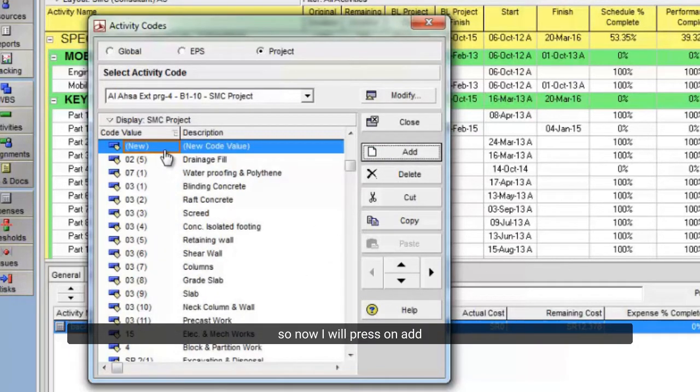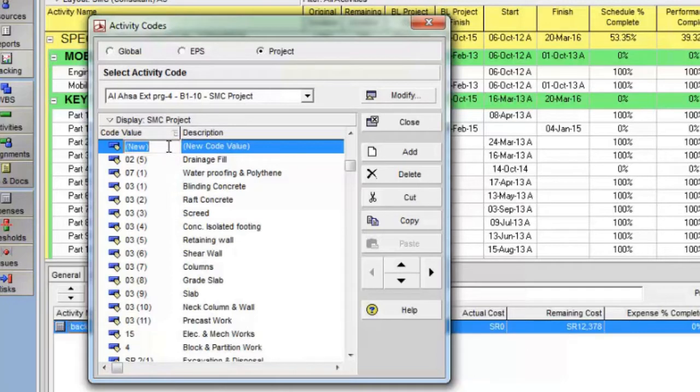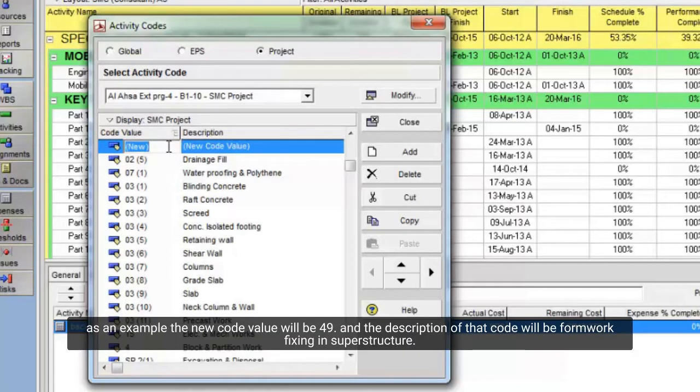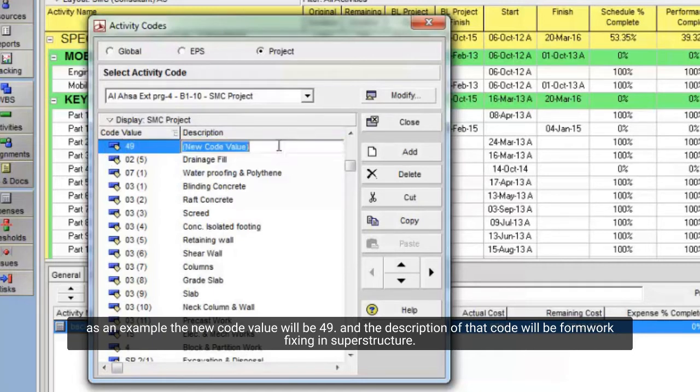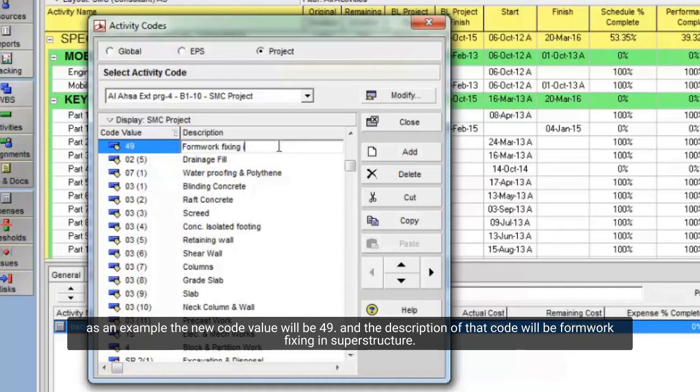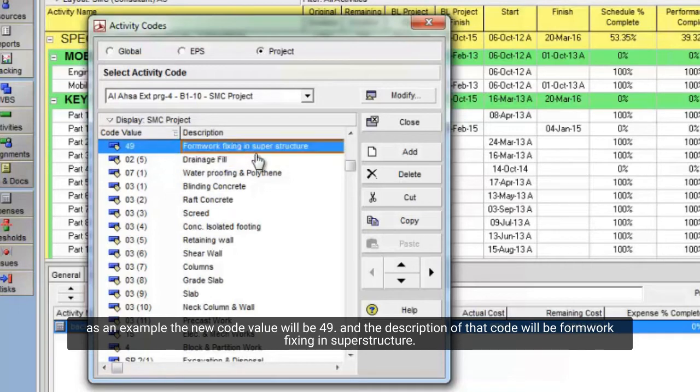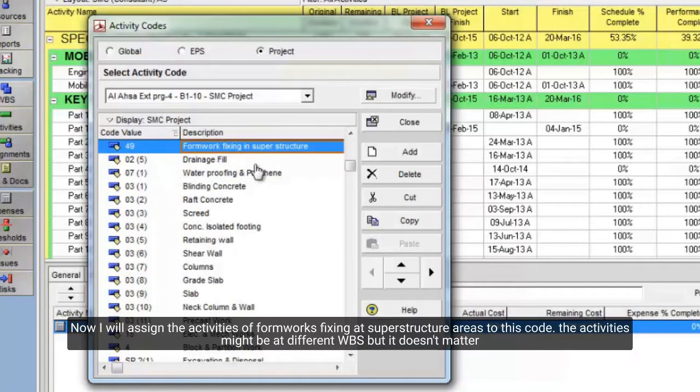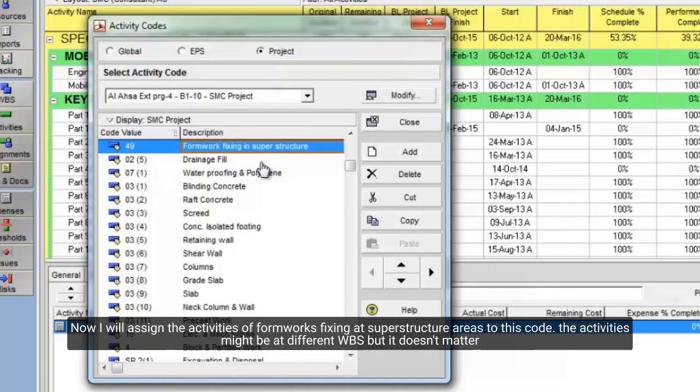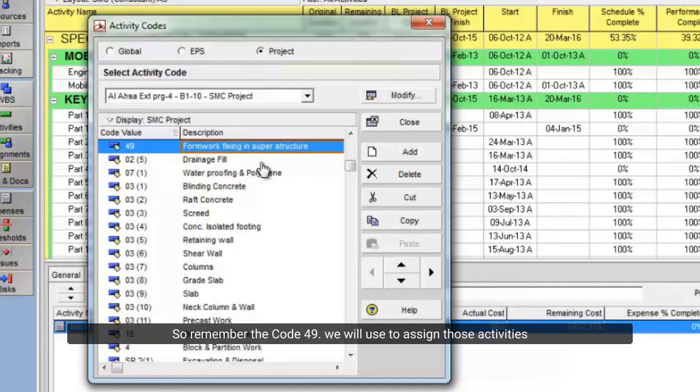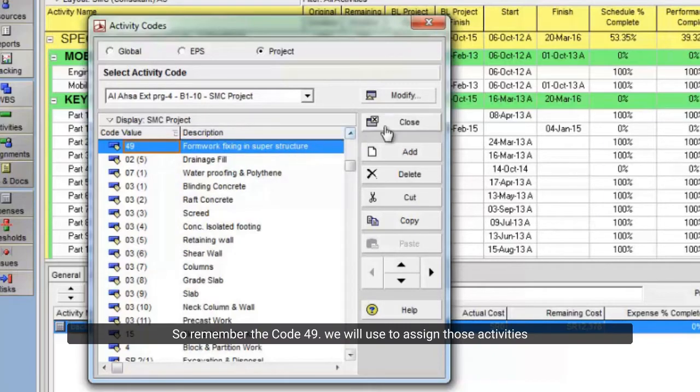So now I will press on add. As an example, the new code value will be 49. And the description of that code will be formwork fixing in superstructure. Now I will assign the activities of formwork fixing in superstructure areas to this code. The activities might be at different WBS, but it doesn't matter. So, remember the code 49. We will use to assign those activities.